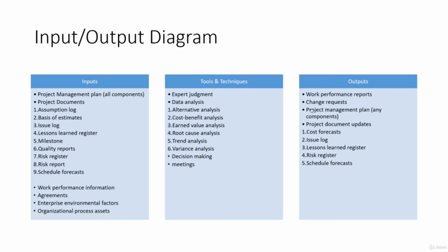It could be a simple Word document where you may simply export the change request and then add a few more columns, add the changes which will be required in your system, and then you simply put the cost. So whatever basis was used to put that cost, let's say you said that a new web service will be needed, will be developed to deliver that change. Now that is the basis for your estimation.